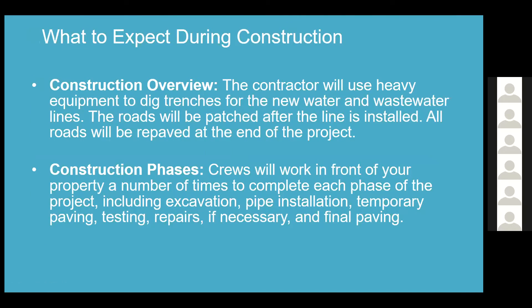As far as what to expect during construction: the contractor will use heavy equipment to dig trenches for the new water and wastewater lines. The roads will be patched after the line is installed, and all roads will be repaved at the end of the project. Throughout the construction phases, crews will work in front of your property multiple times to complete each phase, including excavation, pipe installation, temporary paving, testing, repairs if necessary, and final paving.